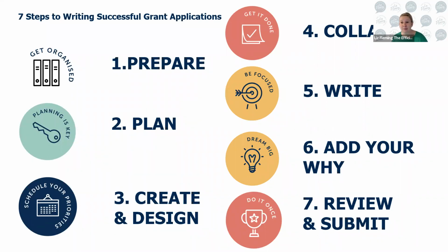But also, if a grant comes out and it's something that you're like, oh, I'd kind of thought about that, or not really, by all means, create a project, that's fine. Just make sure that you've got the resources to do it in the time frame to make that submission, because you don't want to do a whole lot of work, get to the last week and go, oh my God, we've just bitten off way more than we can chew. And then we've wasted all that time. So that does come down to the planning. Who's going to do what is involved, working backwards from the deadline, and go from there.